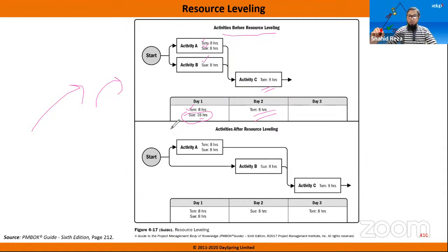So though the schedule is showing we can finish this task within 2 days, as Sue is required and Sue is overloaded, it is not actually possible. Theoretically, it is okay, but practically it is not possible. So then we will apply resource leveling.